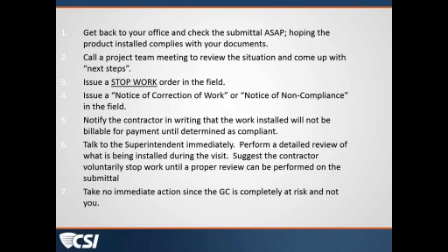I would try to approach it and say, hey, I messed up, I didn't get it back to you in time, and then of course definitely check and see if it's already compliant with your documents. If it's compliant with the documents, then you're okay. You shouldn't really have to do anything else except get your submittal approved and back to the contractor just for paperwork purposes. But I would be somewhat reluctant on number 6 to ask them to stop.